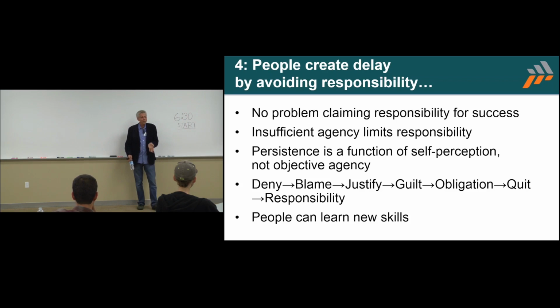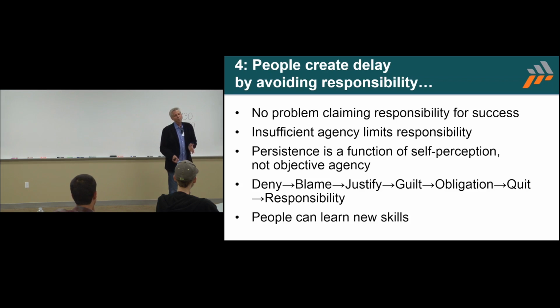And so I've often gone to teams that had 2-week sprints, but they couldn't ship at the end of 2 weeks. And I've said, hey, please just increase your sprint length, because you can't do the testing you need to do to actually deliver this.